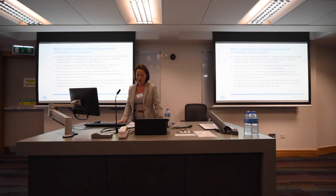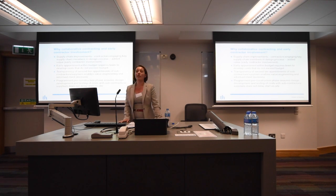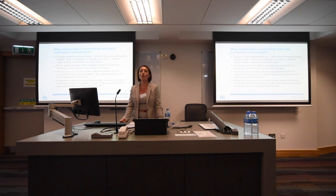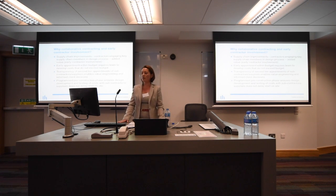So, supply chain improvements. Contractors engaging key supply chain members in the design process get added value from that early contractor involvement. An early appointment within the budget requires the team to develop costs that do not exceed budget, and transparency of the second-tier appointments of subcontractors and suppliers enables value engineering and informed client decisions. And the other important aspect is a programme pre-construction phase, which ensures design development and testing of costs with subcontractors and suppliers that doesn't delay start on site.